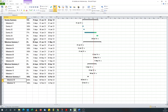So how do we solve this? As you might know, Microsoft Project calculates percent complete based on actual durations for tasks. And where all subtasks are milestones, it still uses the milestone principle of it's either zero or 100%, and for it to be 100% all milestones must be 100% complete. Hence why milestone three here is 100% in the summary. As always, it's a workaround in Microsoft Project.